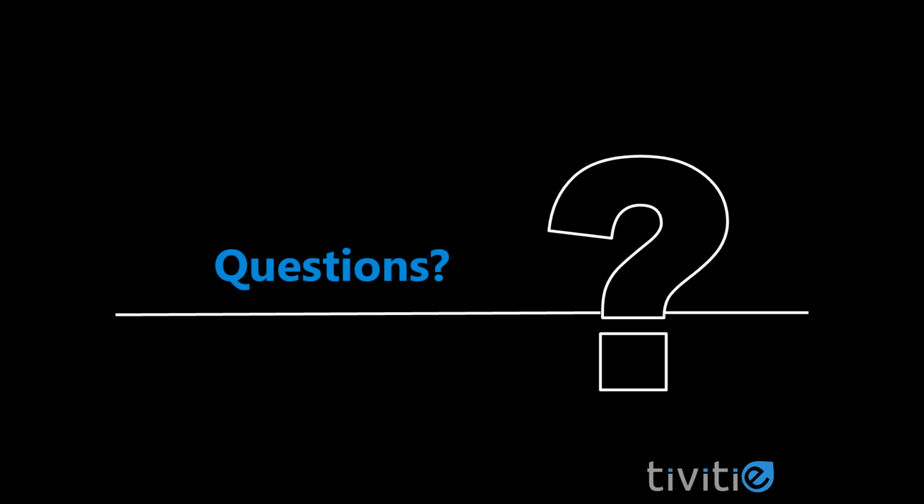So it gets a little tricky. Level of effort can get a little tricky, especially when you're trying to do things with resource leveling. But I would suggest one of those two approaches. Either just know that once you've done your leveling, you are going to have to reevaluate, or pull that quantity out of your max units while you're doing your leveling so that you can take a look and just level the tasks that are truly assigned tasks.